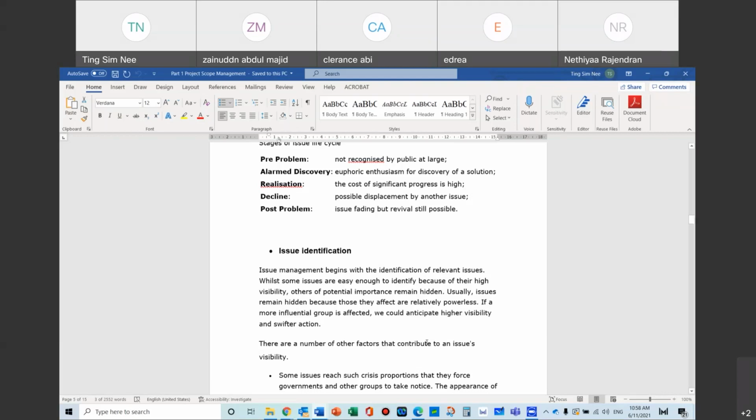I do research in project delays, and you don't know how many times project delays actually come from issues related to site possession, legislative issues related to people, and issues related to cultural heritage. You see, and like I said, in Malaysia, in Sarawak, many things are still doable, lah.